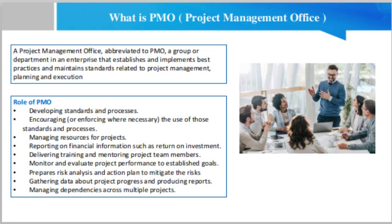So here is the role of the stakeholders in a PMO. The PMO sponsor champions and directs the establishment and evolving operation of the PMO. The PMO sponsor will ideally be a member of the main board. The Head of PMO establishes and runs the permanent office. The Head of Project Office establishes and runs the temporary project office.